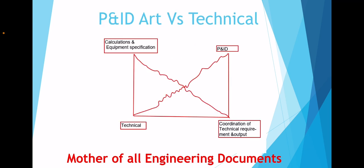Now let's look at whether P&ID preparation is an art or a technical effort. Normally, as basic engineering starts, the process engineering team works on various equipment specifications and calculations — which is a purely technical effort. As that tapers off, the P&ID effort ramps up, wherein coordination between various technical groups occurs to identify all the technical requirements as input into the P&ID. So the preparation of the P&ID becomes largely a coordination effort between various stakeholders.